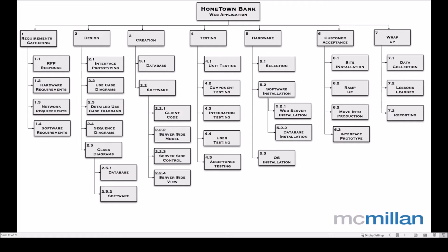And that's the first component of the work breakdown structure, where we start at the top. This is the project, and you can be as descriptive or as succinct as you want. These are the deliverables. That's the next level down of the hierarchy. And then we take each of those deliverables and break that down to the degree that's within our scope of responsibility. Why do I say that?